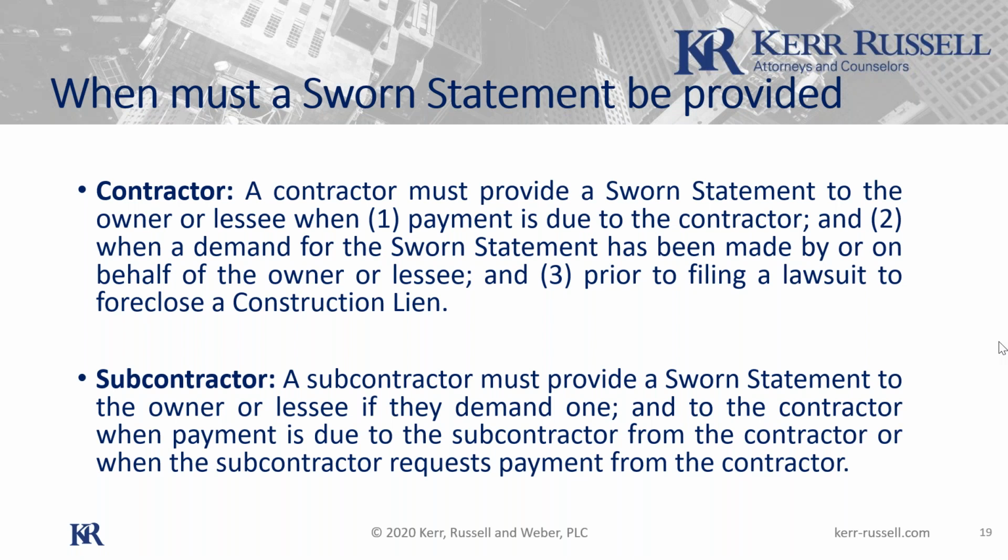And then with regard to the sworn statement, a lot of times people haven't done those. Again, if you're on these more sophisticated projects, you may have been doing them with each pay application, but a lot of times my clients haven't done them yet. And at the latest, I need to send one out before I file the suit. And that includes for you guys as subcontractors. Okay, let's move on.